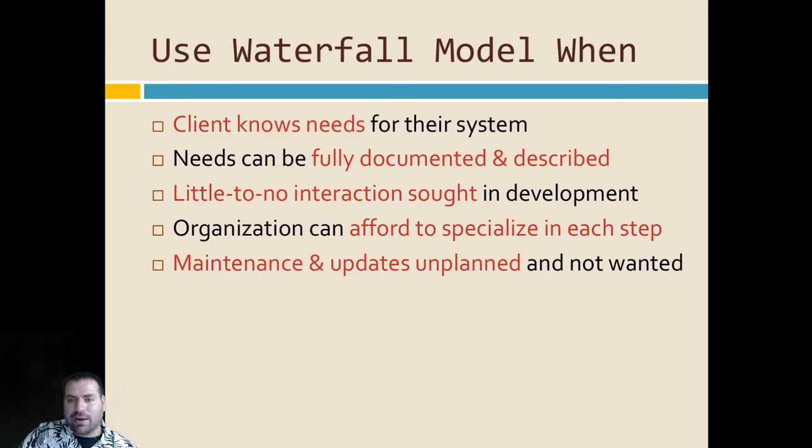One, in a lot of engineering applications outside of software engineering. If you're building a bridge, for example, your requirements are well defined well in advance, and you can use a waterfall method. In fact, you shouldn't start building the bridge before you have everything designed, and that's just a perfect place for waterfall. Within software engineering or building a building, same thing.